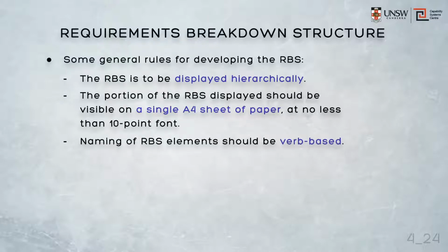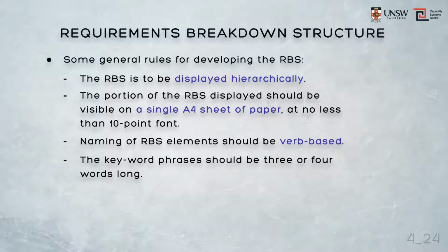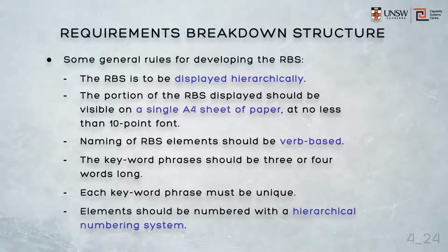The naming of the elements should be consistent, so that the keyword phrases are verb-based. The length of the keyword phrases should be consistent as well. Normally 3 or 4 words are sufficient. Each keyword phrase must be unique, since we need to flesh it out to be a unique requirement. And finally, the elements should be numbered with a hierarchical numbering system so that we can trace from parent to children and vice versa.